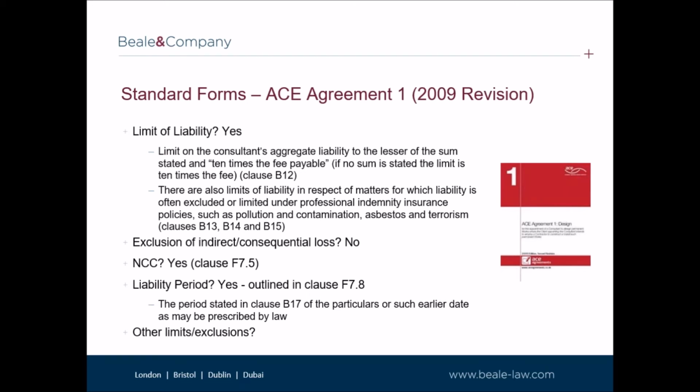Turning now to the ACE Agreement 1 for design, this agreement is a crown jewel when it comes to the standard form that incorporates well-drafted limitation clauses. The limitation clauses are included in F7 of the ACE agreement and the particulars. If you have not done so already, I really recommend that you consider this agreement.